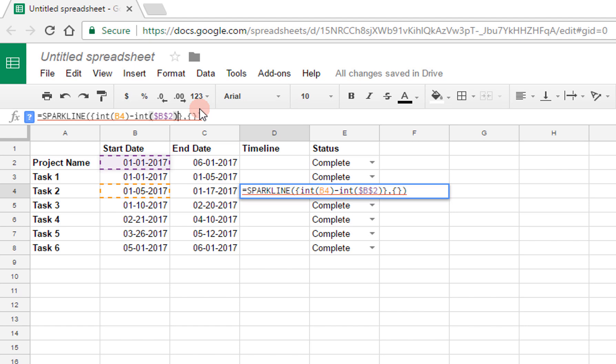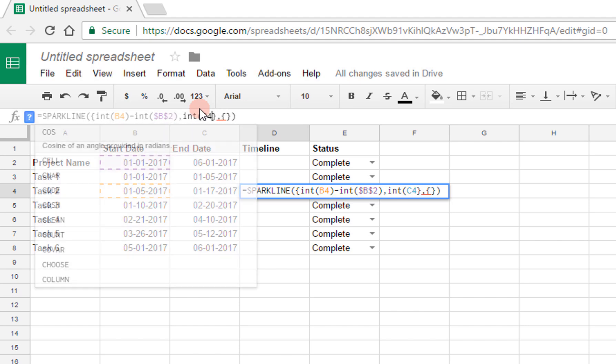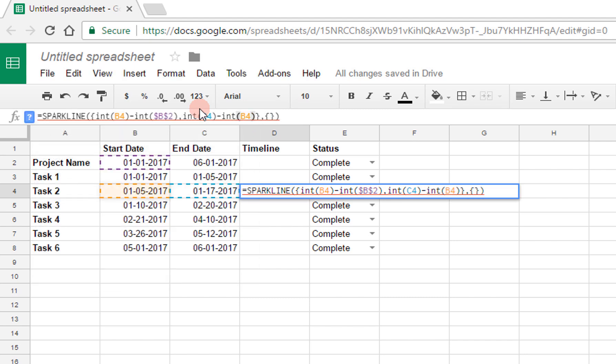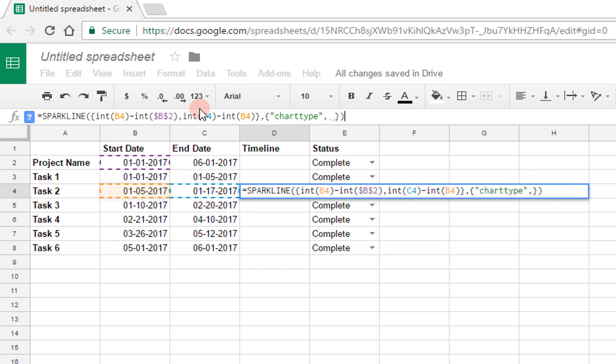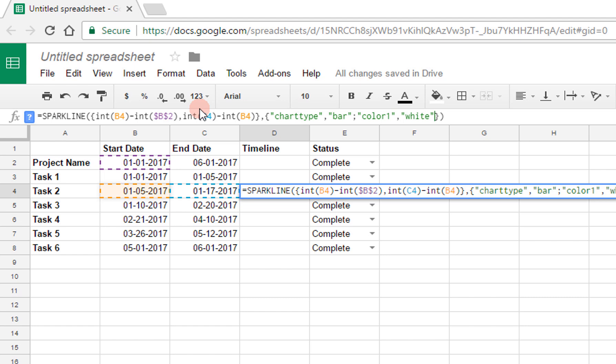I'll show you what I mean a little bit later on when I actually spread the format to the other cells. So this will be my first bar, and then the next piece of data here is going to be int of c4 minus int of b4. So I have my two pieces of data, and then I want to specify what kind of a chart I want this to be. So here I'm going to say chart type, I want it to be a bar chart, and then I specify the colors of the various segments that I have.